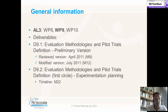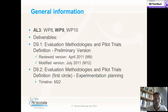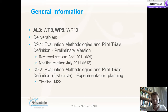Generally speaking, Work Package 9 is located within Action Line 3 — Requirements Elicitation, Experimentation Planning and Implementation of the Evaluation. The deliverables are two: D9.1, Evaluation Methodologies and Pilot Trials definition, in a preliminary version and then in a modified version delivered at month 12; and D9.2, the Evaluation Methodologies and Pilot Trials definition and Experimentation Planning, delivered for the first cycle evaluations at month 22.